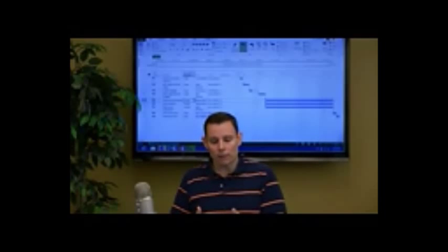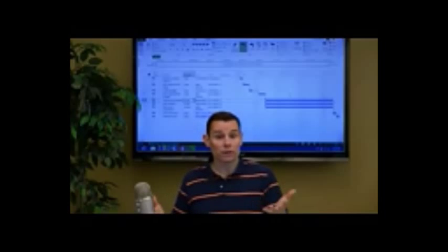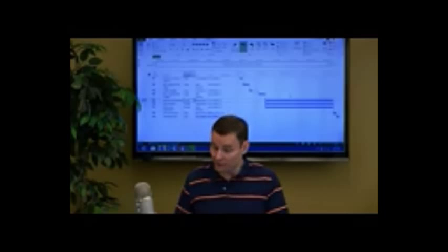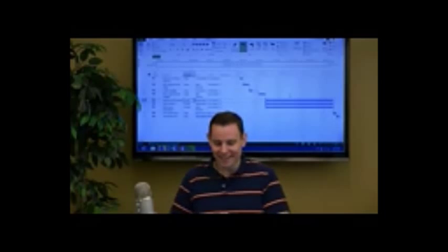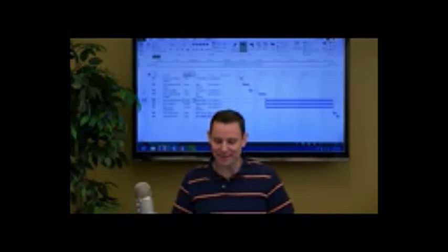And one of the things that's helpful is that you can add your own non-working days. For example, we have Independence Day coming up. That's on July 7th, or excuse me, July 4th. How could you forget that? I was looking up here at this July 7th. It caught my eye. So if you want to allow for a non-working day like a holiday, you go up here to the Project tab, and then you click Change Working Time. This dialog box is very similar. You've got the gray days, which mean non-working, and the white days, which mean working. We're going to go to July 4th, and we're going to add an exception down here. I'm going to type Independence Day. And then we're going to click OK.